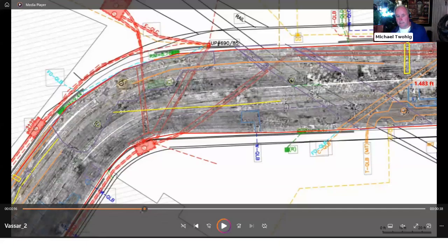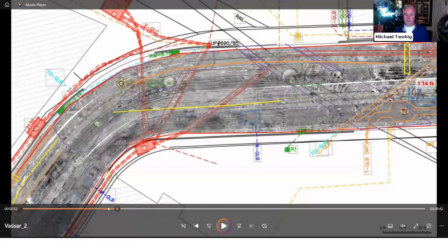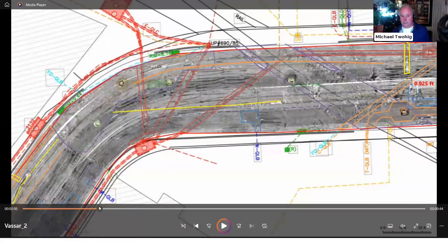Processing time for that very same file, it would have taken us about 2 weeks to do the entire C&D on that street. It would have taken us probably 2 weeks to extract all the data, compress it, and go through all the historical records and put it together. So this is not really representative of a normal project, but this is a very intensive project.